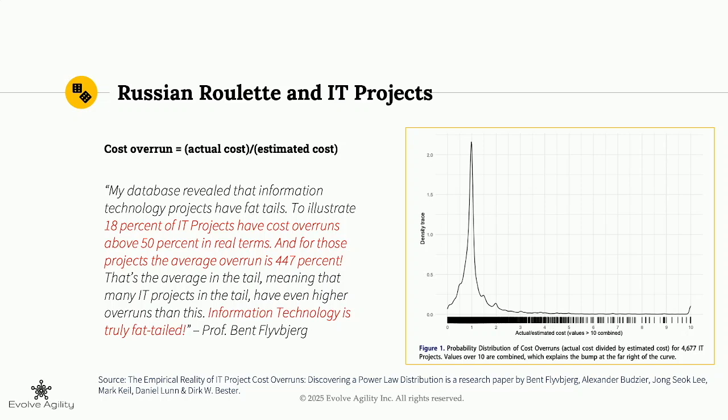In other words, if you create a project that is 1 month in duration, the worst that could happen is it would take you 6 months. But if you create a project plan for 1 year, the worst that could happen is 6 years, conditional on the survival of your company. If your company survives it, then 6 years maybe, but most likely it won't.